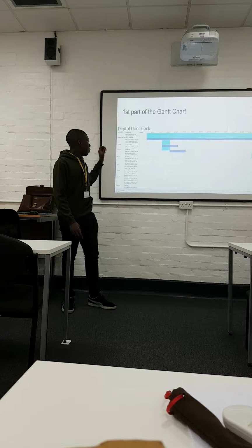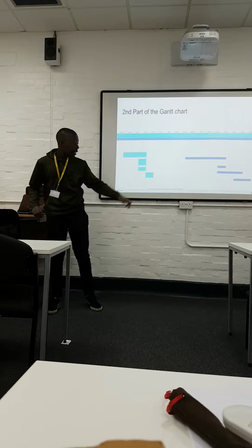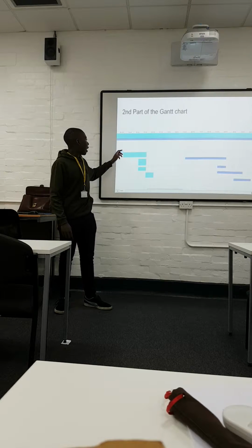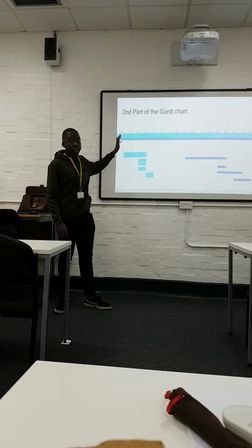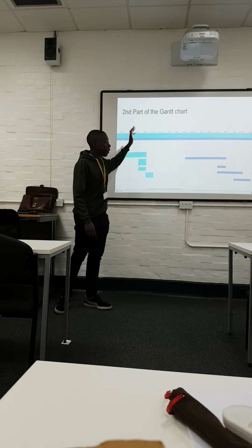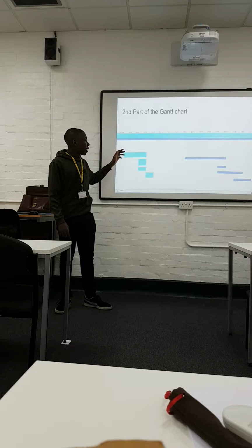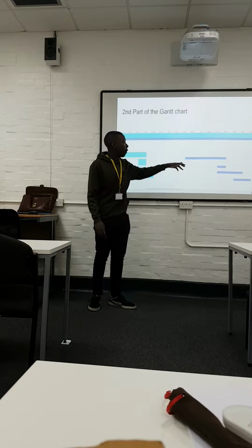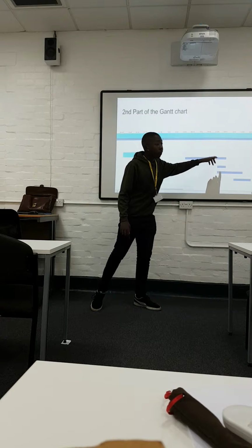When it comes to the build section on the next page, I said I'd start on the 3rd of January and finish on the 17th of January. But instead, I started on the 28th of February and finished on the 28th of March.